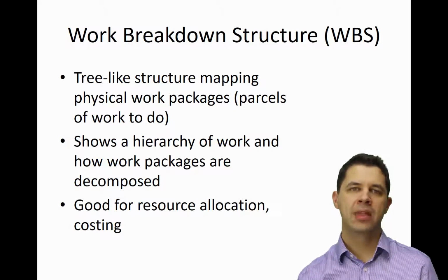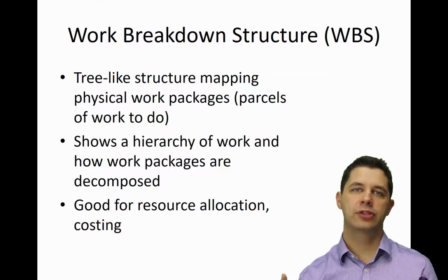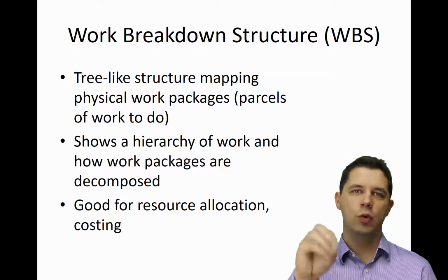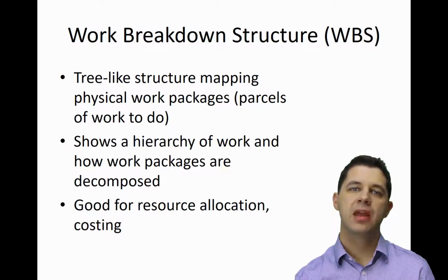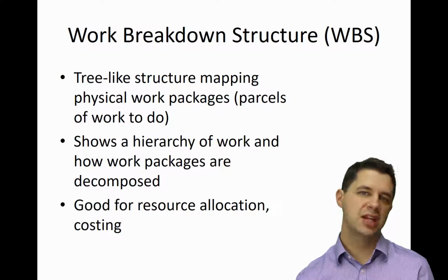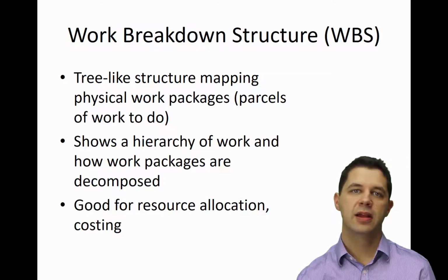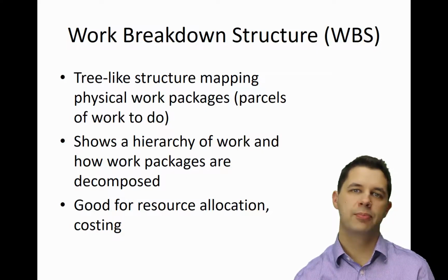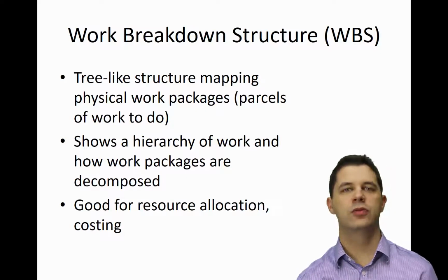breakdown structure. Essentially, it's a tree-like hierarchical structure which maps physical work packages or parcels of work that need to be done. So it shows a hierarchy of work and how different work packages are decomposed. This can be really good for resource allocation and for costing, because essentially the cost of a project in large part is a sum of all the individual parts or the sub-projects that need to be created to create the full project.